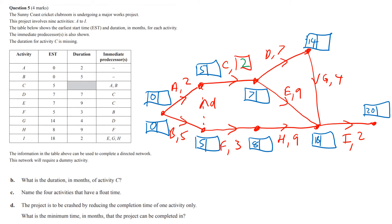Now we do the full critical path analysis — the backward scan. Don't forget the dummy has a value of zero. Going backwards: 20 minus 2 is 18, 18 minus 4 is 14, 14 minus 7 is 7. Then 18 minus 9 is 9, so between 7 and 9 we choose the minimum: 7. Then 7 minus 2 is 5. Going the other way: 18 minus 9 is 9, 9 minus 3 is 6, but also 5 minus 0 is 5, so we choose the minimum: 5. Then 5 minus 5 is 0, and 5 minus 2 is 3.